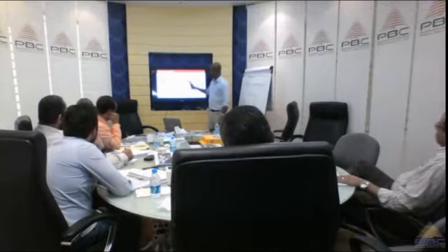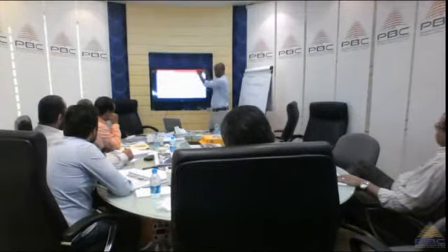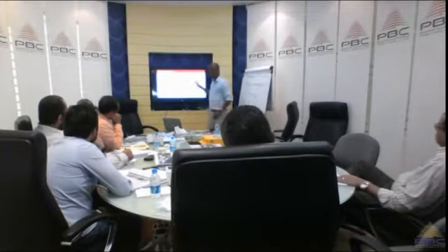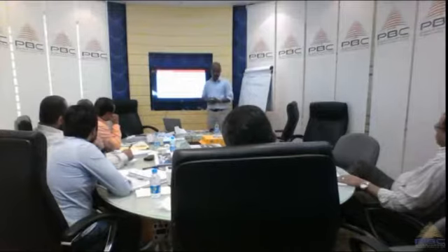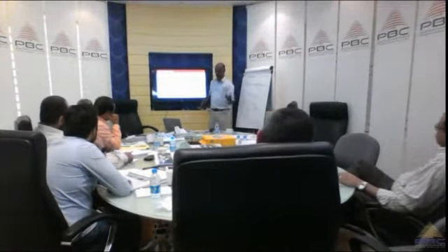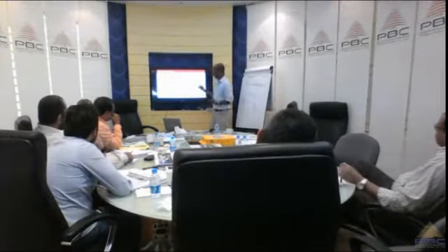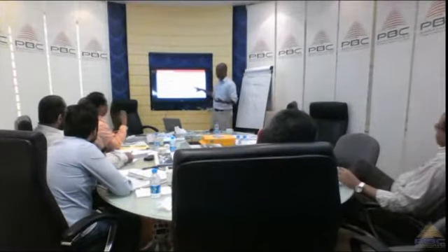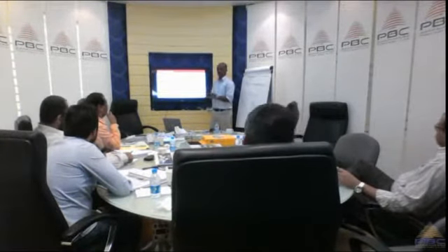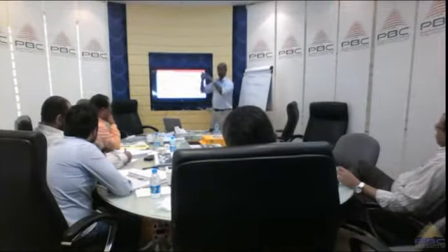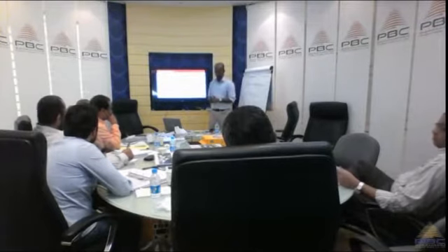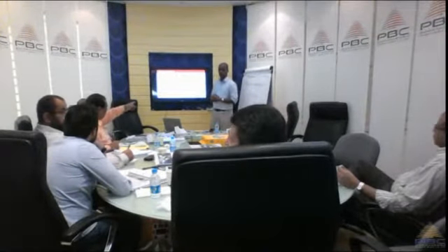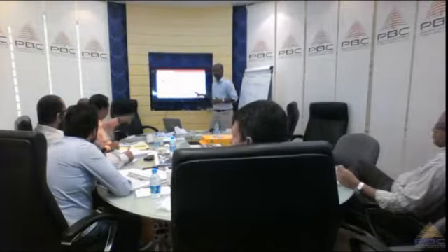And these inputs and outputs, if you check all the control processes, you will see the same things appearing in all of them, because the concept is the same. I'm comparing planned to actual and then acting. If anything is happening and I need to change things, I issue a change request. If it's business as usual, I only issue my work performance information, which is my periodical reports. Okay? So this is what's happening in these kinds of processes.